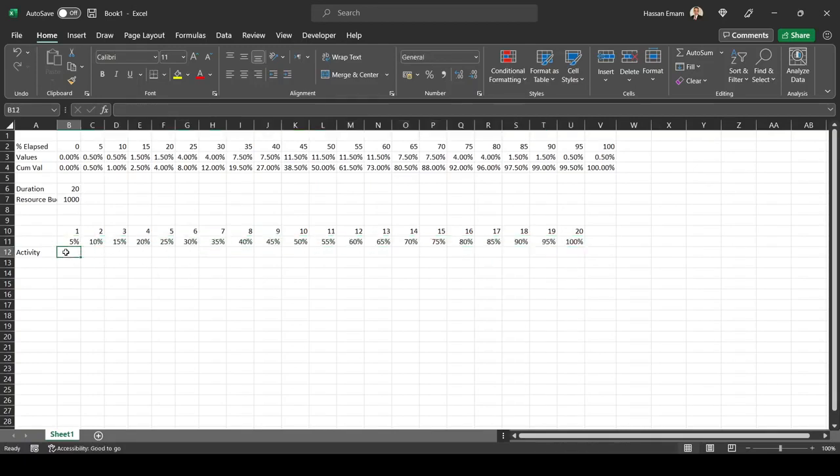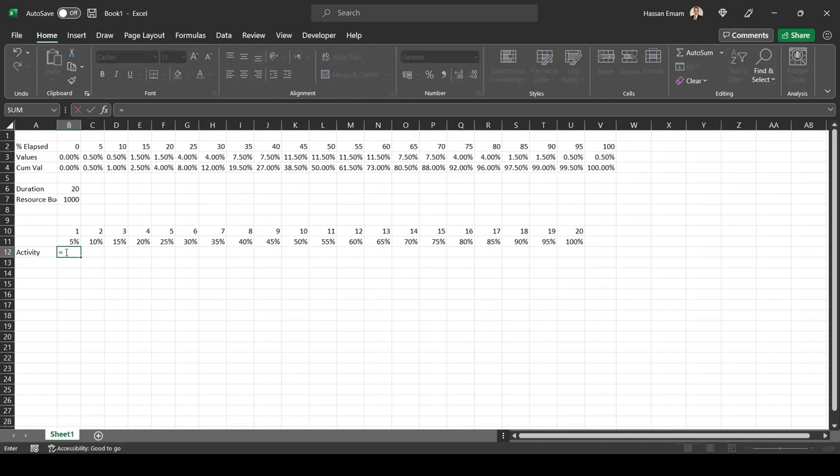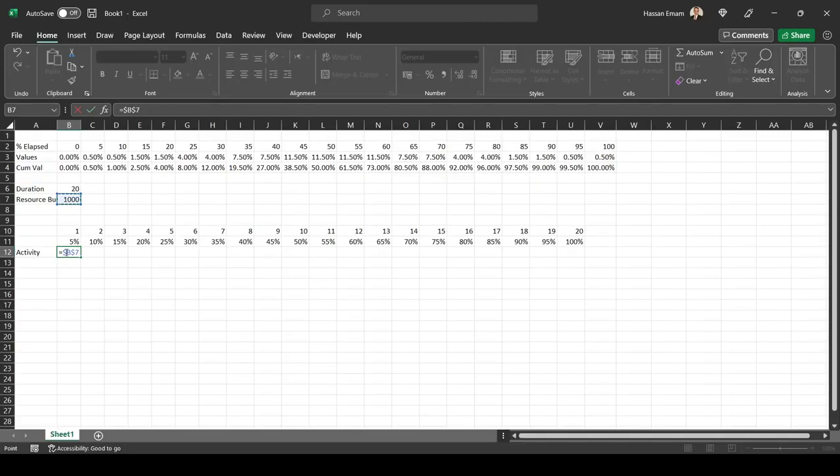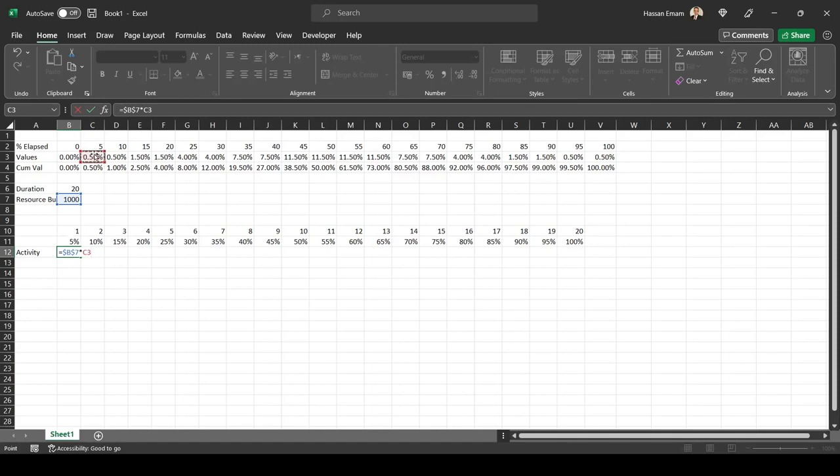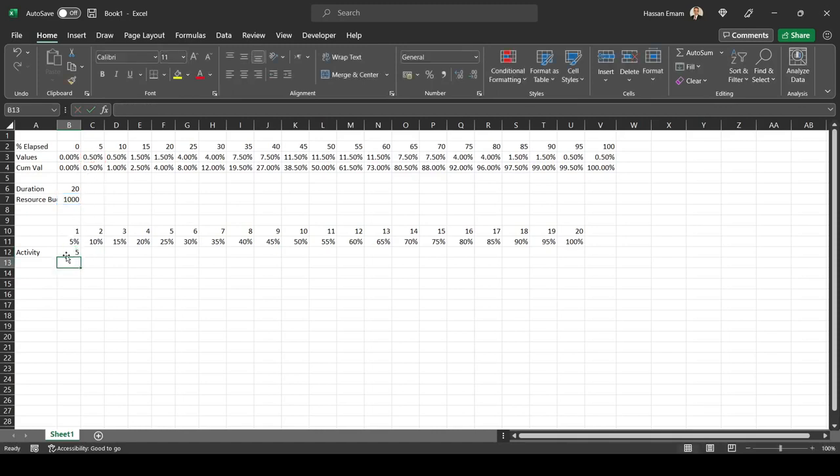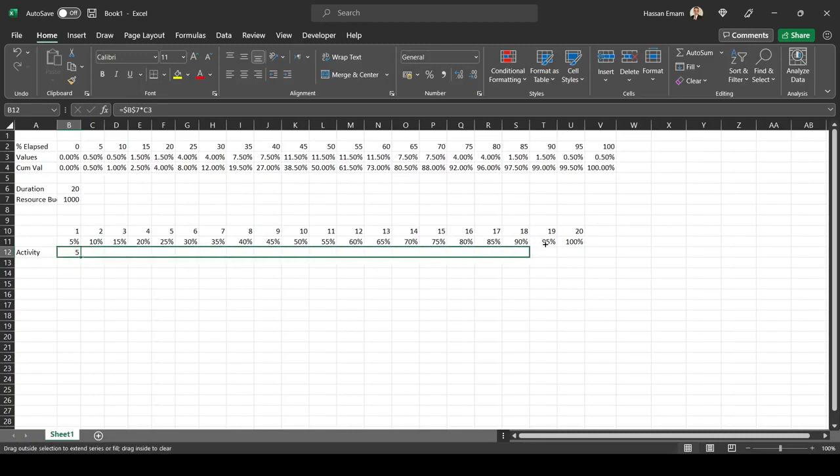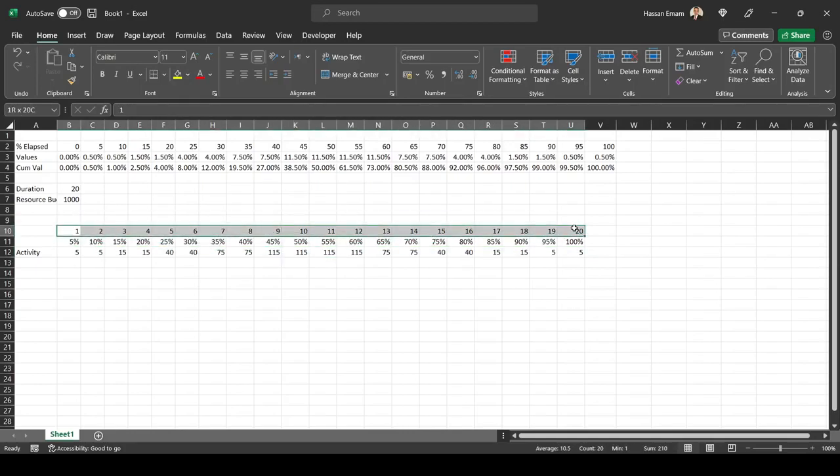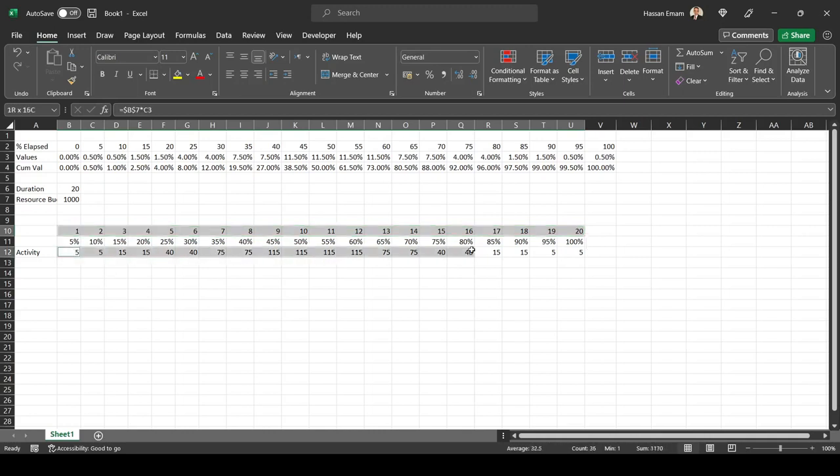In order to get the amount assigned to each period, what we need to do is multiply this value by the budget, and make that fixed. We need to multiply it by the corresponding value that we have in there. Because this is five percent, I'm going to pick this value. Then we will do that formula, apply it to all, and let's see how this looks on a curve - does it look similar or not?